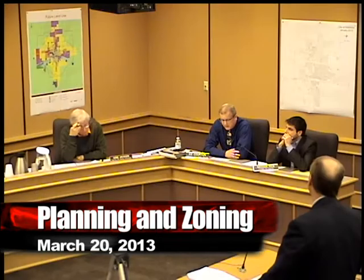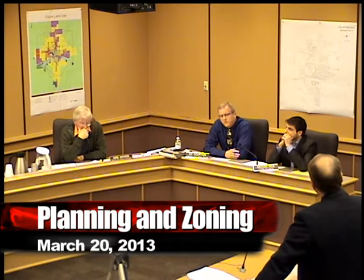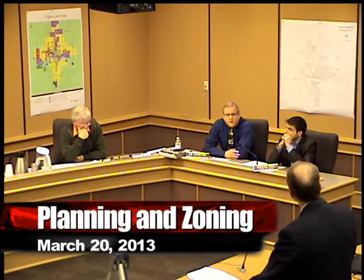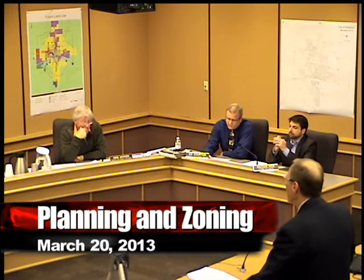Larry, the reason for the condition is the same that we held up on your apartments. You have to have 2 access points to it, right, and that would include your plat there. You know, Westridge Drive to the west, extending that's not going to be problematic, but we can't issue any building permits further to the west without that secondary access. Right, and I understand that. And it's a fire issue. It's strictly uniform fire code. So without that road or another access point being paved and a legitimate one for emergency access, we couldn't issue any building permits. I understand that, and I'm going to offer a suggestion that I think is acceptable.